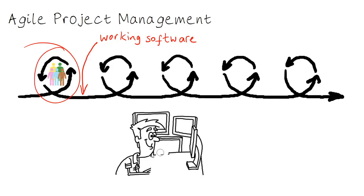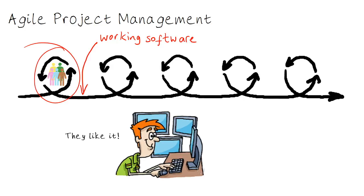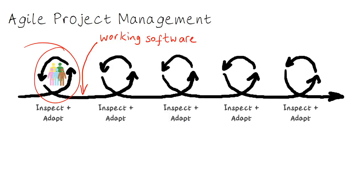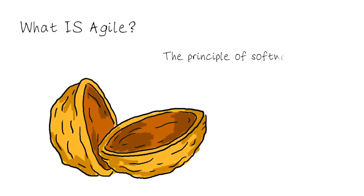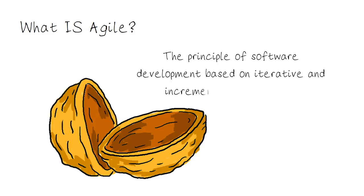Because each iteration is so short and we're getting user feedback so fast, we're learning what works and what users want as we go along, rather than having to anticipate it all up front like with the waterfall approach. So we're inspecting and adapting as we go along with each iteration. And because these cycles are so short, we can change direction very easily. If market conditions suddenly dictate that a particular feature is of higher priority than we originally planned, then no problem — we can work on that on the very next cycle. So we can refine our definition of agile as the principle of software development based on iterative and incremental development.